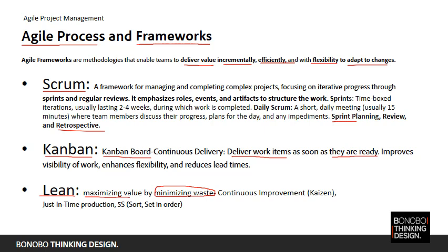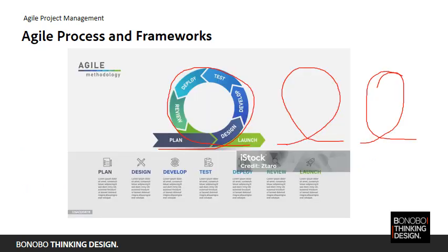And then you execute those activities, sprint execution, and then you review them in daily scrums. Followed by that, there's a sprint review, and then a retrospective, which is about all of the team members sitting together, figuring out what went well and what went wrong, and how to improve as you move forward in your journey. And Kanban is a Japanese term that means a signboard, or billboard.